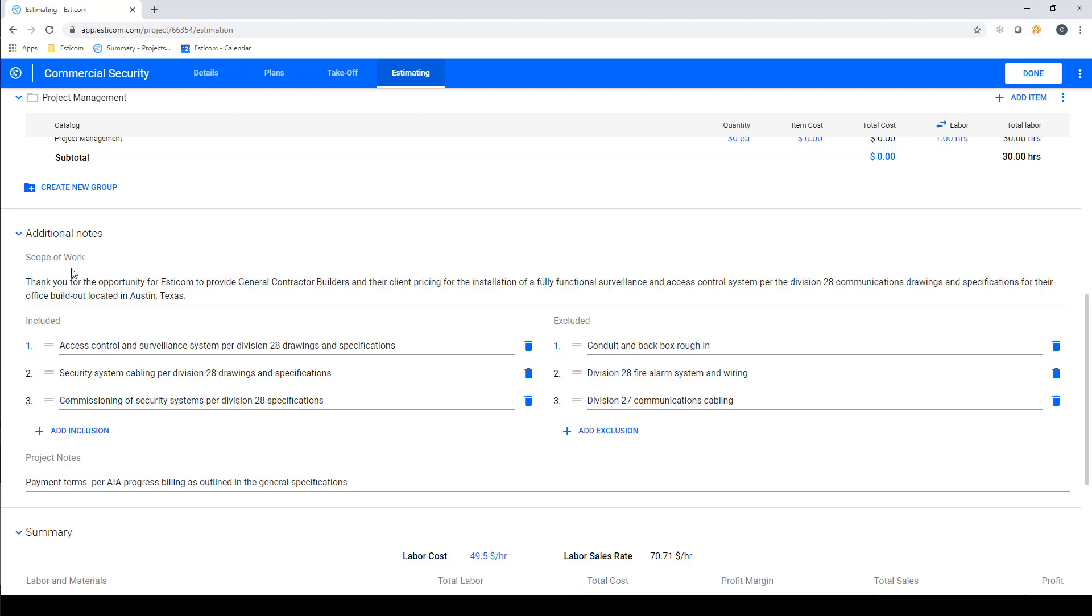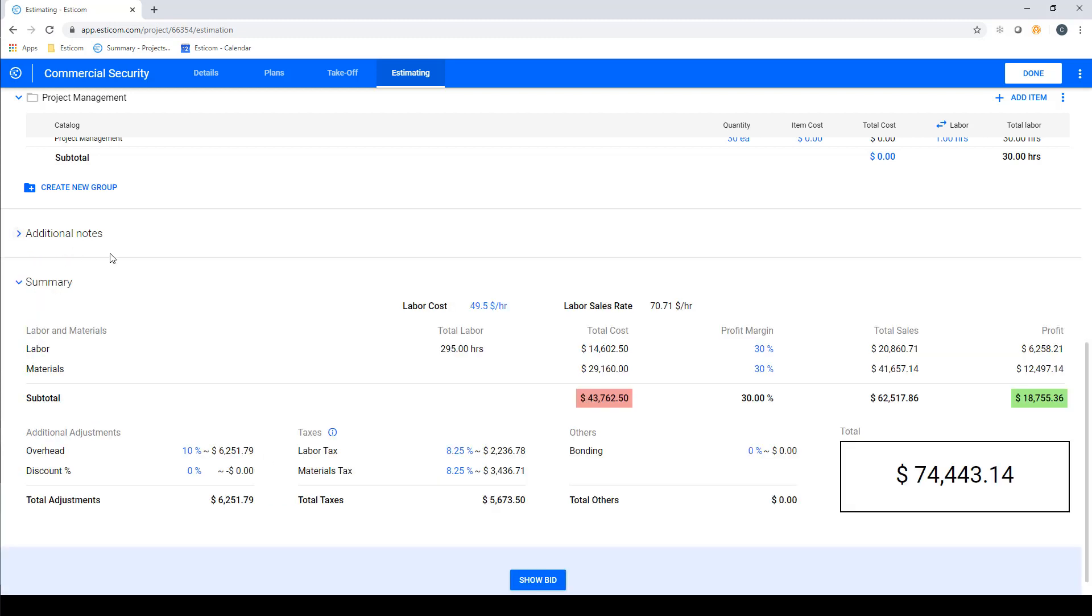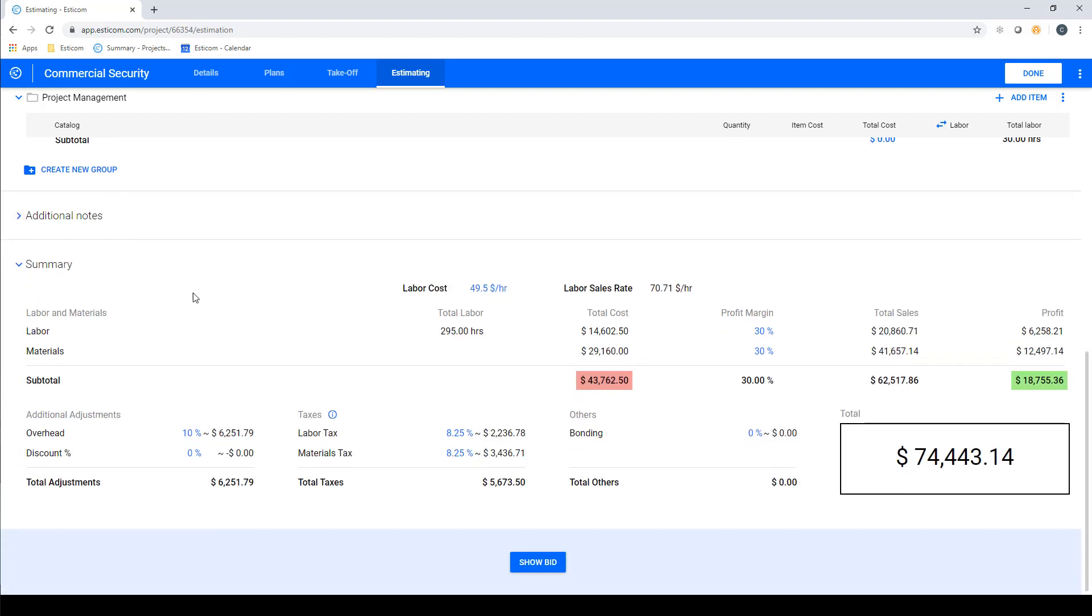Below the notes section, we have our summary section, where we can enter our fully burdened labor costs based on a composite crew, and in this case is $49.50 per hour. Here you can see the total labor hours for the project, and when multiplied by the labor cost per hour, gives us our total labor costs for the project.